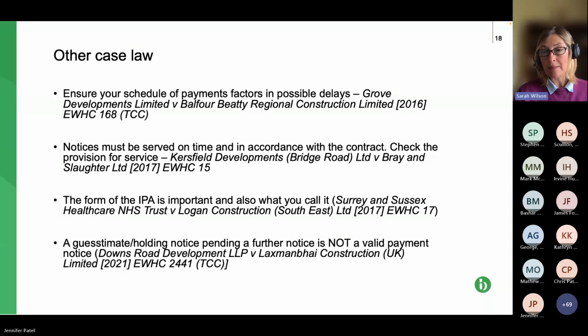The contract says, and the court took a very literal approach. The contract says your payment process is set out in this schedule, and basically the last date is whatever the date was. There's no way we can imply anything into this contract. And unfortunately, that meant that Balfour Beatty had to wait until the final account process before it could recover any further money. So, that's pretty dire in terms of cash flow.